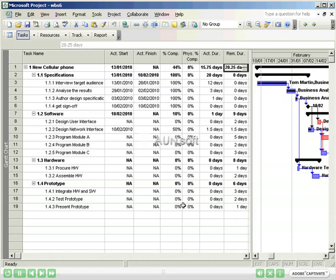I've gone ahead and recorded other activity on the project. All of the tasks in the Specification Phase have completed. And I've marked the actual durations. Several tasks took longer than estimated, and one took less time.